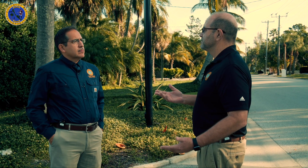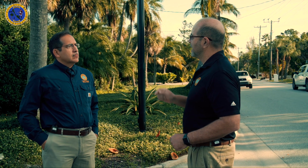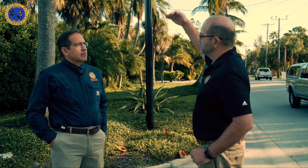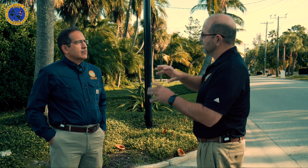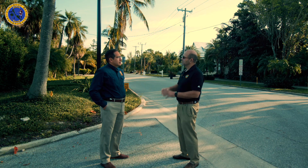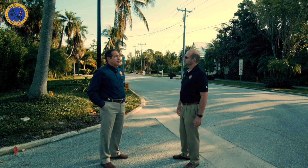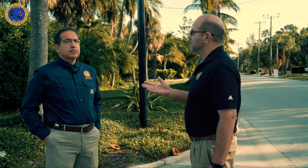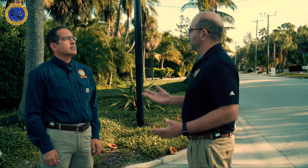And the viewers may not realize that, our residents, that we have to go with our contractor to every single house on the island and make that conversion from where it was being fed by an aerial wire, and now it's being fed underground, and that is an individual switchover at that home. That is exactly correct. It's individual, it takes time, it takes a lot of coordination and due care, but that is how it happens. And we talked almost 3.5 years ago that this was about a 3.5-year project.